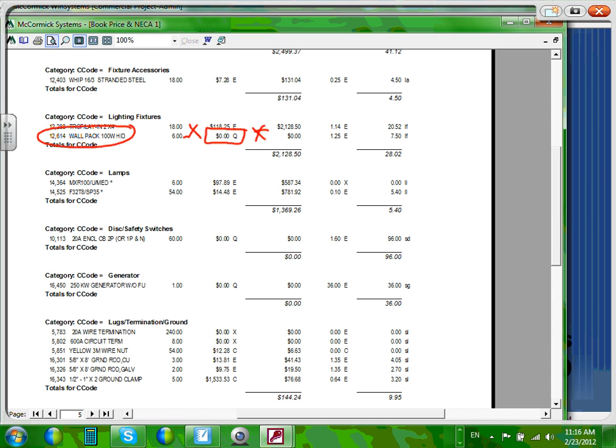$0. Why? Coated material. Right next to it, Q. Anything you see Q is what? These are $0. But look at the labor, though. They are assigning a labor for them, aren't they? They are assigning a labor. We have a labor, though. That's why we took it. The question would be, Tal, why should I take it then if I'm going to assign a $0 value for it? Because I want to take the labor. Can I have thumbs up?